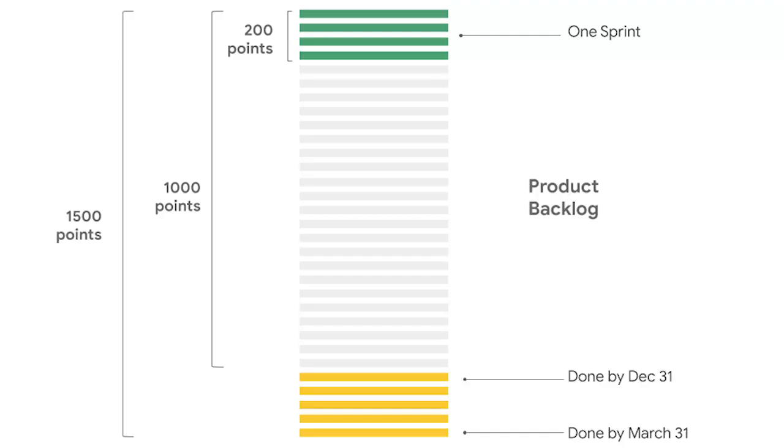Scrum, in my opinion. Let's imagine that our Virtual Verde team has averaged 200 points in each monthly sprint for the last 3 months. The team knows they have 1,500 points left in their product backlog. They now can say that it will take them approximately 7 or 8 sprints to complete the entire product backlog. What if it's July and the team wants to know what will be available by January 1st? No problem, that's 5 months away. Just go down the backlog from the top and draw a line when you hit 1,000 points. That's a pretty confident estimate based on the past performance of the team.